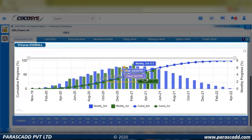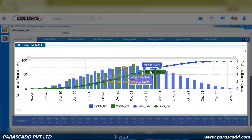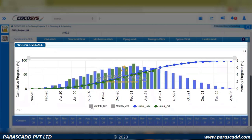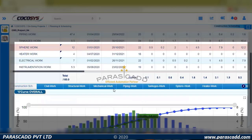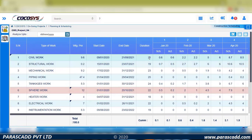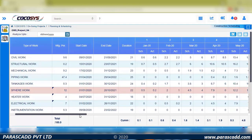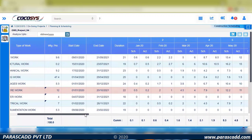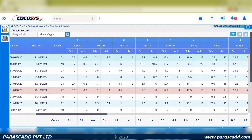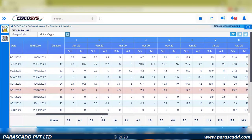This is the weightage distribution. I'll go to the curve — the system generates the scheduled curve and the green color represents the actual curve. There are options to show or hide progress, schedule, monthly actual, and monthly schedule. The system plans for 21 months. Based on the standard S-curve, at the seventh month the schedule percentage is 25%, meaning one-third of the duration achieves 25% progress.